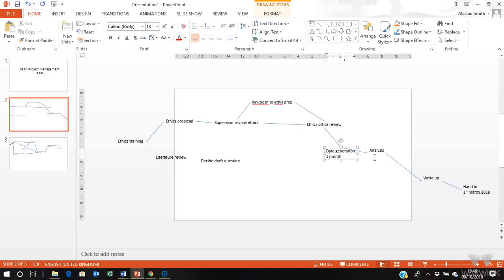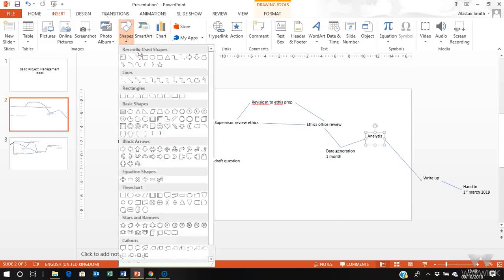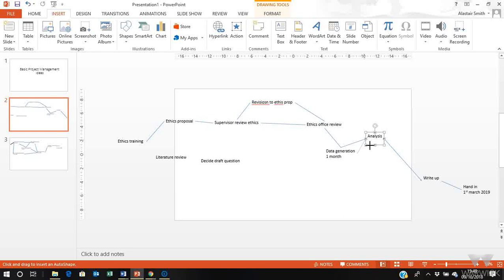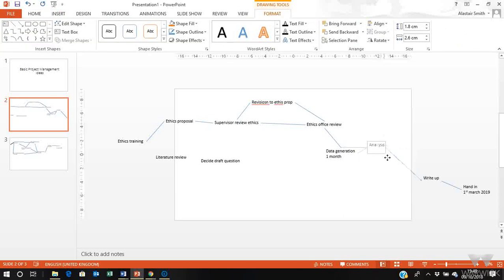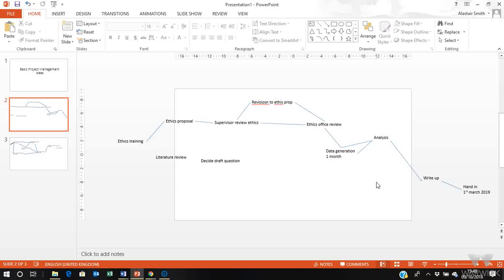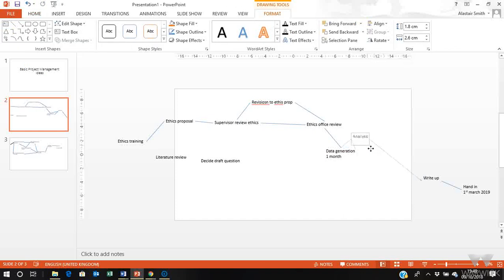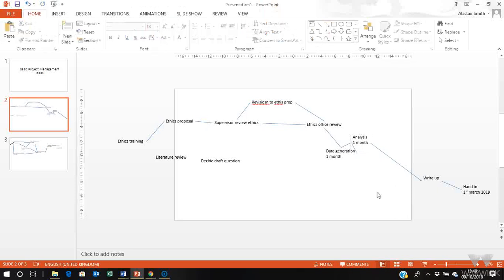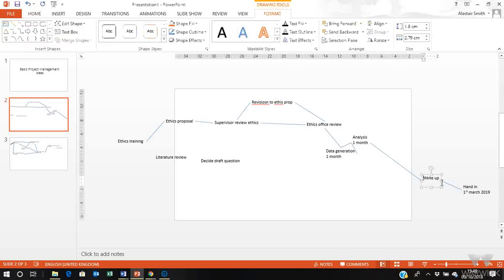And although I can start maybe some of my analysis a little bit before having done all of my interviews, maybe, I am going to have completed all of them before I can finish my analysis. So that might overlap a little bit there. But analysis, thinking about how it might overlap a bit, let's say, for the sake of argument, another month. So now I know that I've got at least 5 interviews, going to do a month of analysis. That sounds like quite a lot of work, another month.